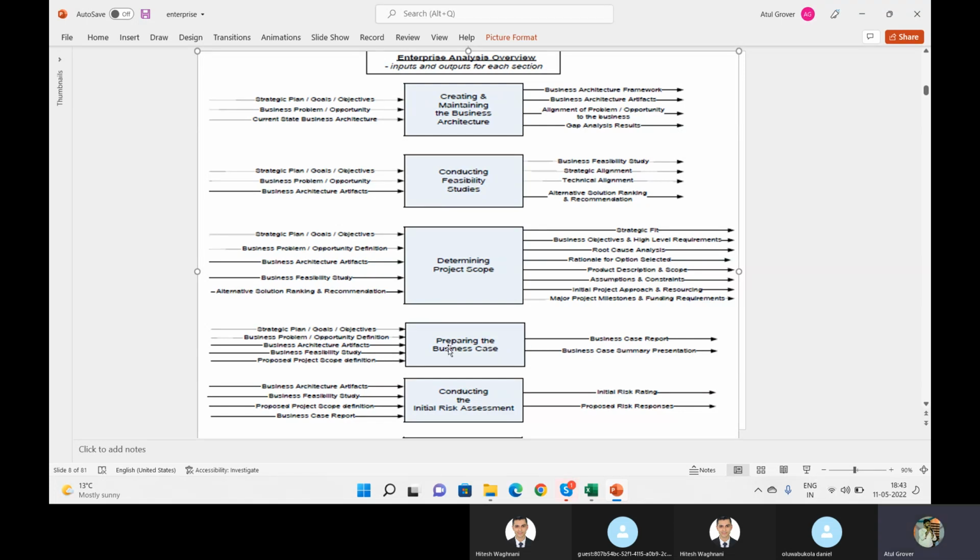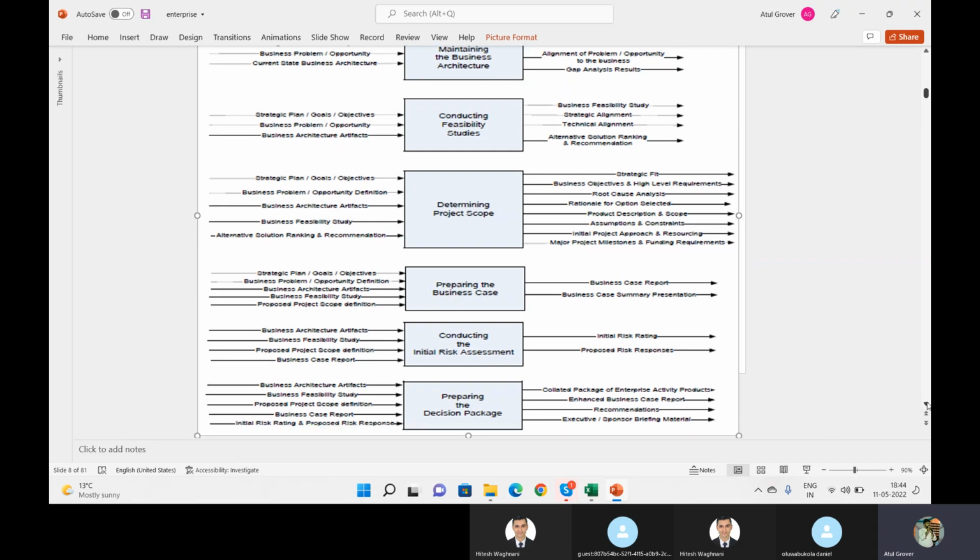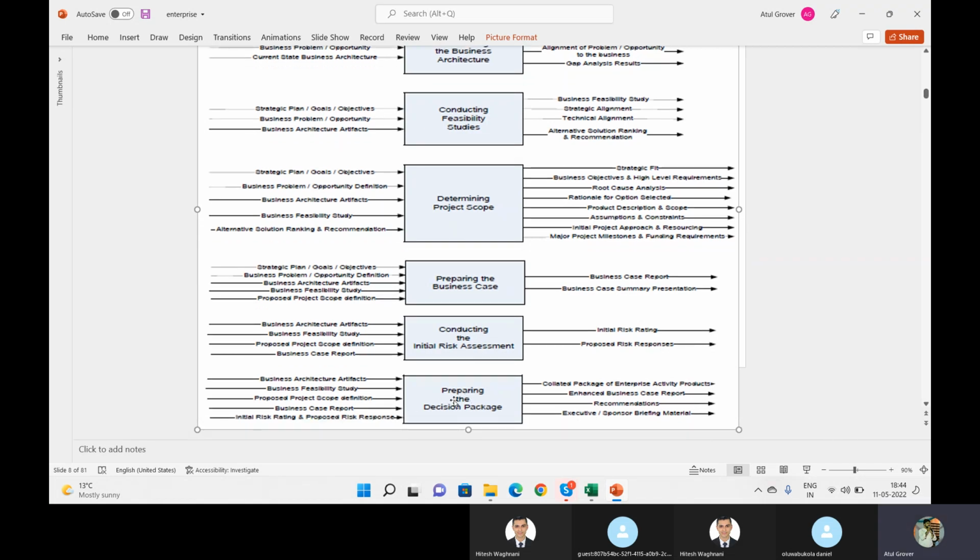That is the thing. I do the business case. Along with this, it is not the end of this analysis. Along with this, I did the initial risk assessment. Maybe it is the third day, and after 10 days you say, Atul, you are so boring, we cannot continue with you, we are skipping this training now. Maybe I did the initial risk assessment as well: if someone leaves in between the training, shall I charge the full fees, half fees, no fees, what do I need to do? And at last, I prepare the decision package.